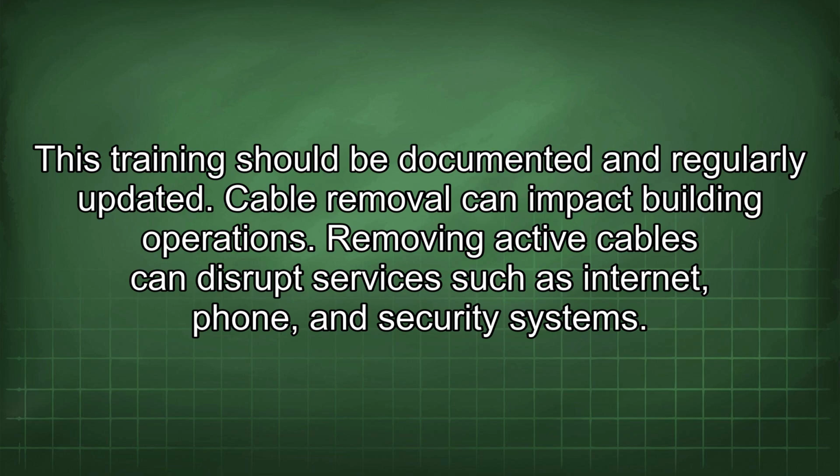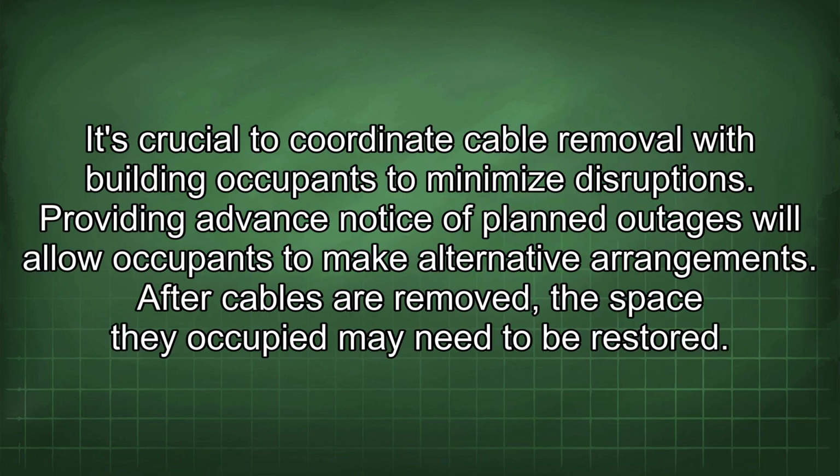Cable removal can impact building operations. Removing active cables can disrupt services such as internet, phone, and security systems. It's crucial to coordinate cable removal with building occupants to minimize disruptions. Providing advance notice of planned outages will allow occupants to make alternative arrangements.